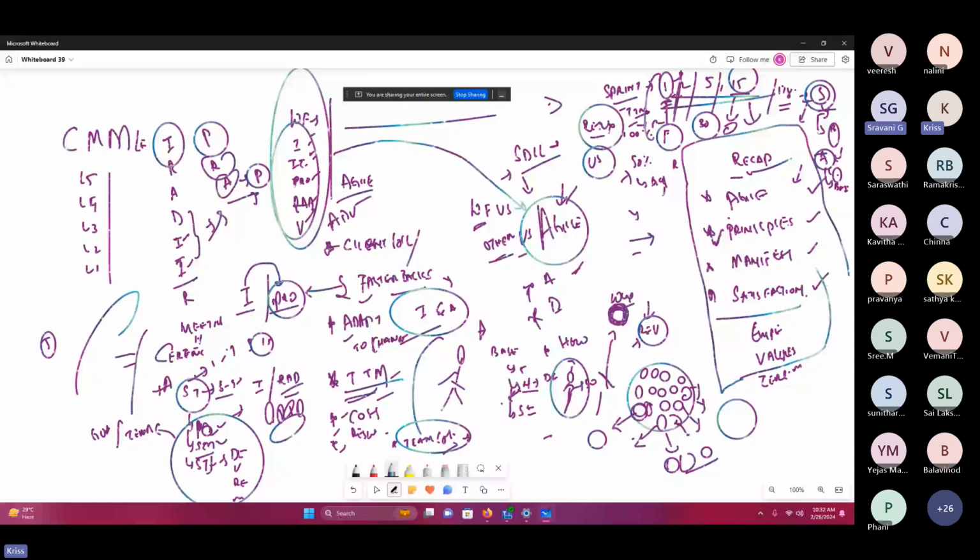Now, when it comes to these ceremonies, we will have a daily ceremony, which means daily meetings, and this meeting will take approximately 15 to 20 minutes. They define these numbers also: which ceremonies you need to follow in this Agile framework, how much time you need to spend, and what the agenda is for each ceremony. If you take the daily ceremony, it's the daily stand-up.